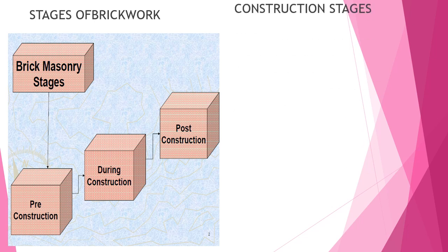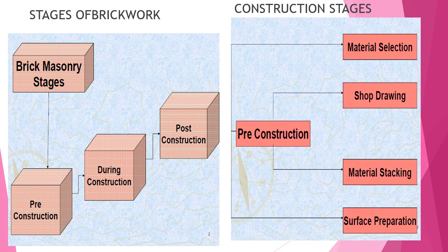The brick masonry stages include three stages, known as pre-construction, during construction, and post-construction. In the pre-construction stage, you have to have material selection, a shop drawing, proper material stacking, and surface preparation.